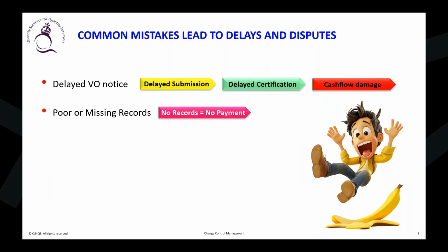If you want to succeed with the payment for your claims, you need the records. No records, no payment. There are plenty of sub-clauses in the FIDIC. They talk about the importance of the records. Actually, you should know you have to price this documentary work in your contracts. You have to hire at least a certain number of document control team to manage your project, especially under the contracts team.